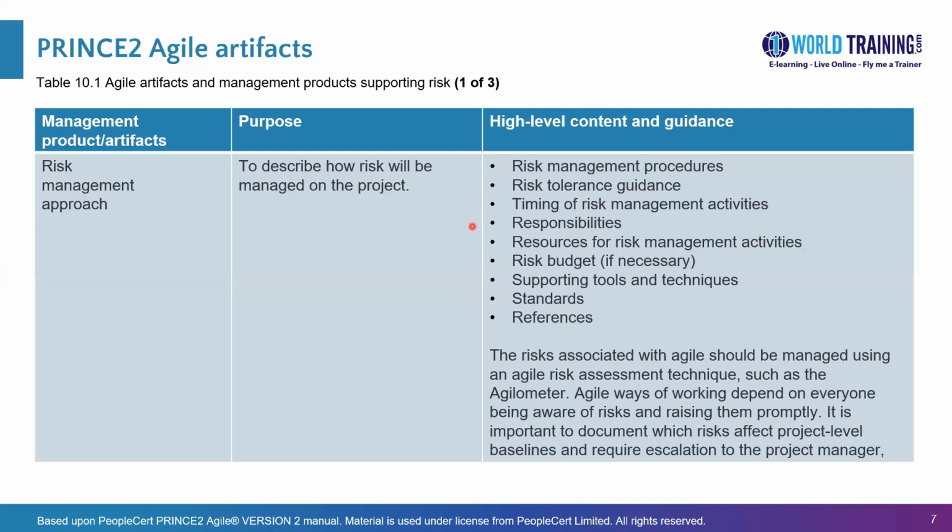Responsibilities in terms of who contributes to risk management. There could be a risk manager, usually the project manager, otherwise somebody else could be appointed. There could be a core risk management team, etc. Timing of risk activities, such as when certain risk identification sessions will occur, for example, monthly, or once at some point in time. And there could be something like a risk audit timeline as well, a procedural audit as well as an audit of implementation actions.